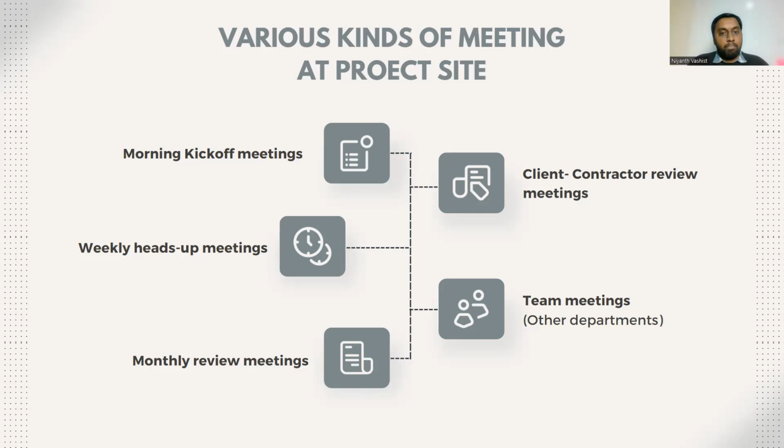Next, we have weekly heads up meetings. In a heads up meeting, it is more of the contractor taking the role of a host and telling the client, see, next week we are going to do this. If there is billing involved, you need to pay an advance or pay according to that. Or if any other clearance is required, the client has to get the clearance done. So it is a heads up meeting from the contractor side.